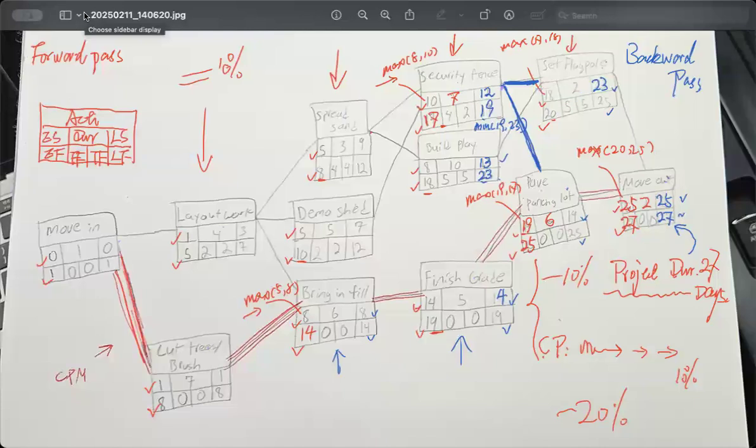So you consider both of them means you need to consider this 23 and also those 19. So you are using the minimum of it. Because if you delay, if you change the day here to 12, that means this 23 for setting the flag part is okay, right? But your parking lot maybe has an issue. So we need to make sure this one is smaller than those two. Does that make sense to you? Yes, we're all good. Okay, good.